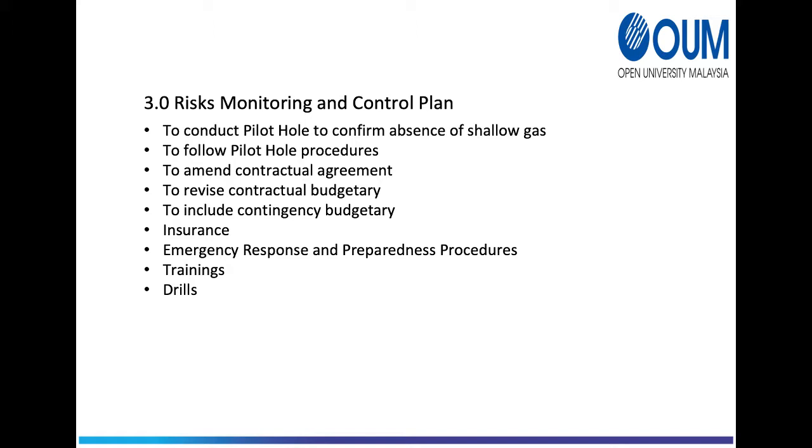Other controls like toolbox meetings, and vessel drills such as fire, abandon ship and pull-out drills were conducted regularly during the campaign to ensure crew preparedness in the event of a shallow gas incident. All these meetings and drills were recorded and documented and submitted to stakeholders for deliberation and reference.